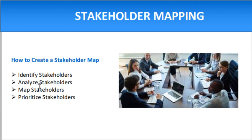The procedure to create a stakeholder map starts with identifying stakeholders. At the beginning of the project, sit with the customer and create an Excel sheet listing each stakeholder's name, role, position, and contact number. It is very important to identify all stakeholders. If you miss any stakeholder, they will be identified at a later stage, which will become a huge problem — they will come up with new requirements and a rework will be required to include those requirements.